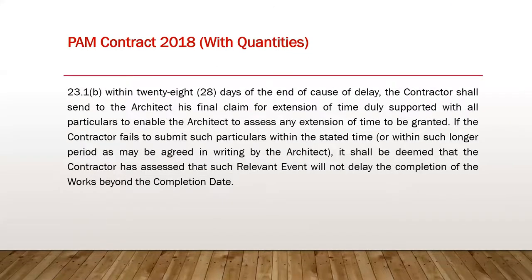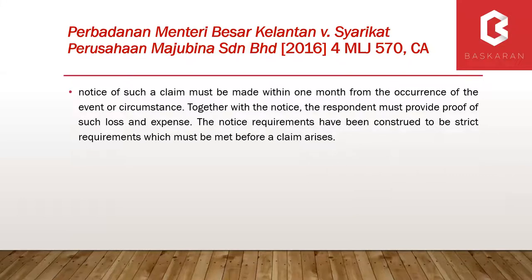The Court of Appeal has recently provided clarity on these clauses. The clarification was in relation to the JKR-PWD form of contract, but in my view it would be equally applicable to the PAM form of contract. Indeed, the terms of the PAM form of contract in this regard are more expressed than the JKR form — PAM actually specifies that notice is required and that if you don't give it, it is a condition precedent and you would have waived your claim. This is expressly set out in the PAM 2018 contract, unlike the JKR contract which has perhaps less expressed wording.